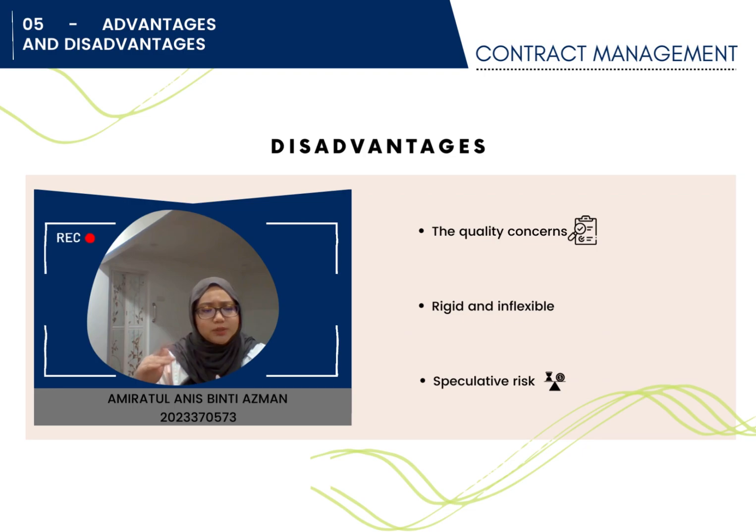So due to the possibility, the contractor will need to revise the design or find a different material, so this could cause project delays and require extra expenditure during the construction phases.